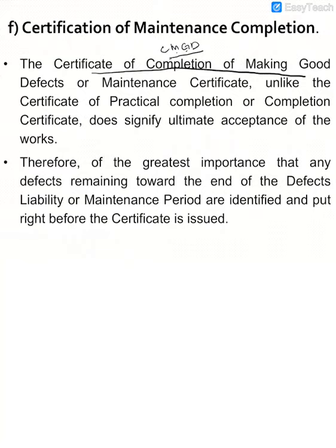Meaning that the contract is ultimately accepted, they have to accept all the works. Only when all the works and the maintenance works are fully done can they issue the CMGD.